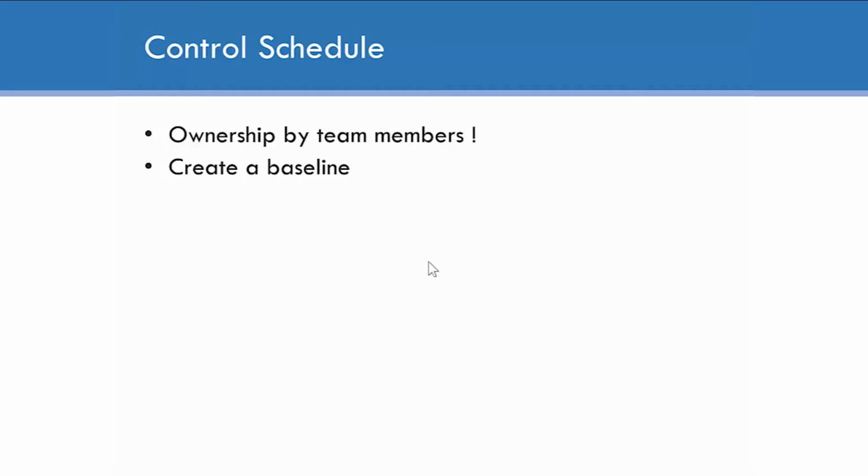Well, I say always stays the same. There are two times when that baseline could change. One is where there are significant scope changes, and you change the remaining schedule to suit those scope changes. And another time is if the schedule gets quite out of control so that the baseline doesn't mean anything, you're probably going to have a replanning session and create a fresh baseline.